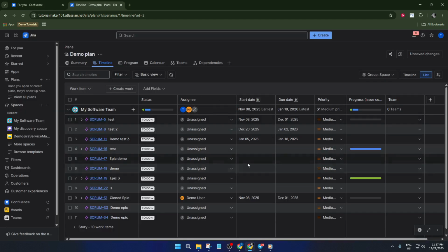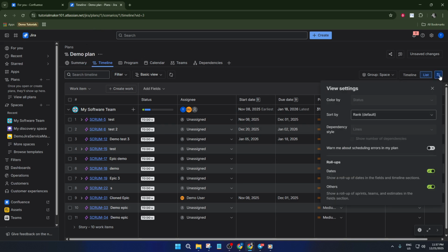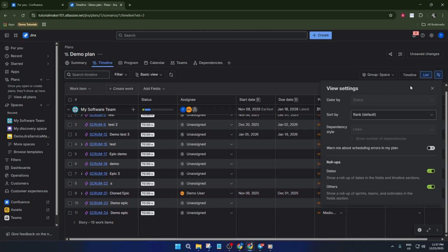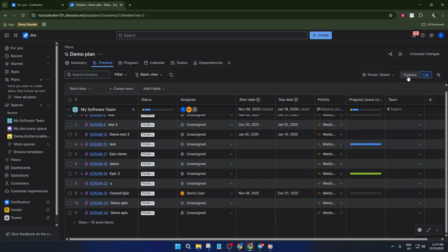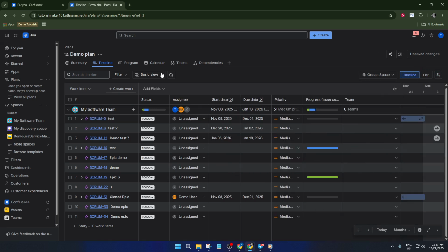One step that's crucial but sometimes overlooked is capacity mode. This lets you add your actual teams to the plan, alongside estimated workloads. Picture this as making sure you're not assigning the same person to 5 different launches in the same week. You'll immediately see resource gaps or overloads, which means you can balance workloads before you're knee-deep in crunch time. You can also assign releases, tying your work directly to plan launches or sprints.